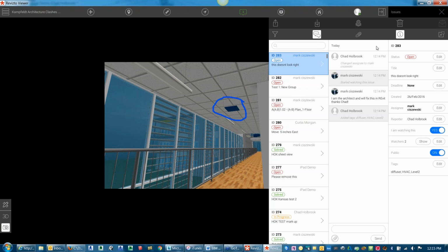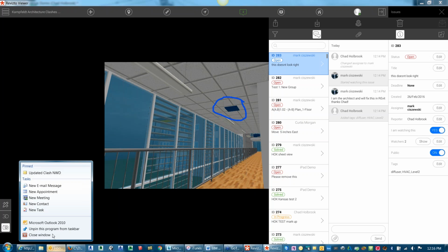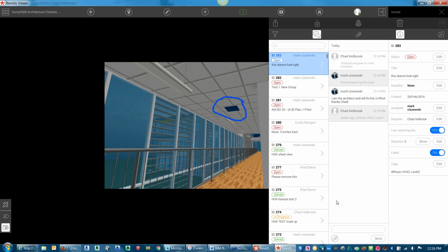So, this wasn't a system to replace our RFI tracking by any means. This was a way to preemptively find out what issues might exist and how we might be able to address them. And then, who knows, a confirming RFI might have come out of this, or an RFI still might have been written, but at least we were getting ahead of the issues and we weren't just hitting them when it's too late. We were trying to head off these issues way before they became issues in the field.